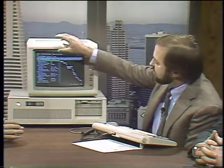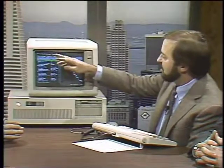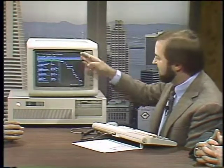This is a schedule that I've made up here for maybe a kickoff for an ad schedule. I've got a campaign here, and I've got some tasks that I have to be careful of. I'm going to be watching things like how long it takes to do market research and where my client presentation falls, and several things in here are going to be important to me as I manage the schedule. I've got a list of things to do, I have the people who are going to be working on them, and I've got a bar chart on the right that shows me about when those tasks are going to take place. You notice I've got a calendar across here, so I can make those kind of coincidences there.